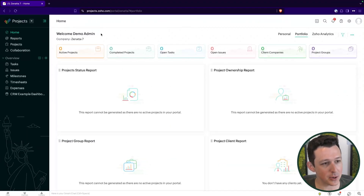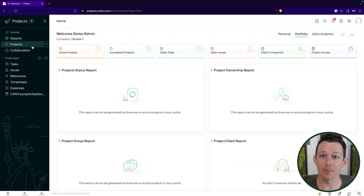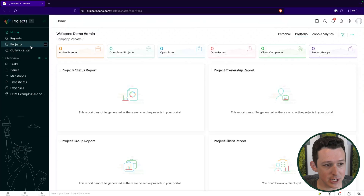So let's jump on in. Projects is a big application with tons of functionality. When you launch a new project, you really don't want to be starting from scratch — it takes a long time. There are a lot of objects to create: milestones, task lists, tasks, dependencies, due dates. So even if you're a business with a decent amount of variability between engagements, even if you can make a template that's like 60–70% accurate, it's still going to save you a lot of time.